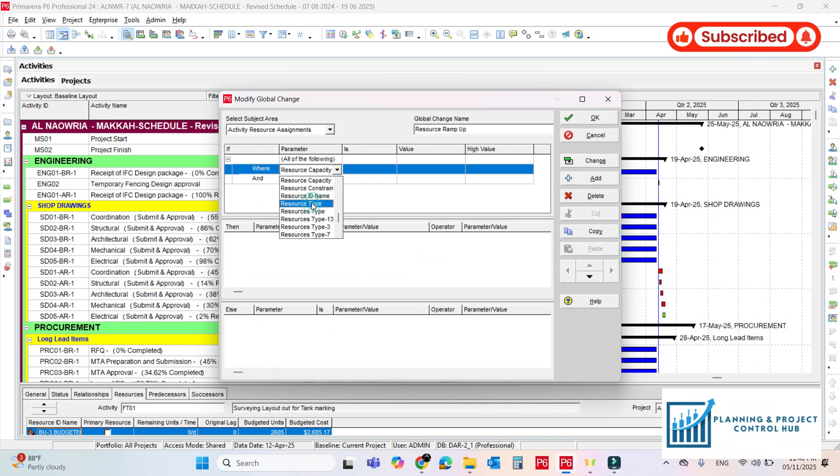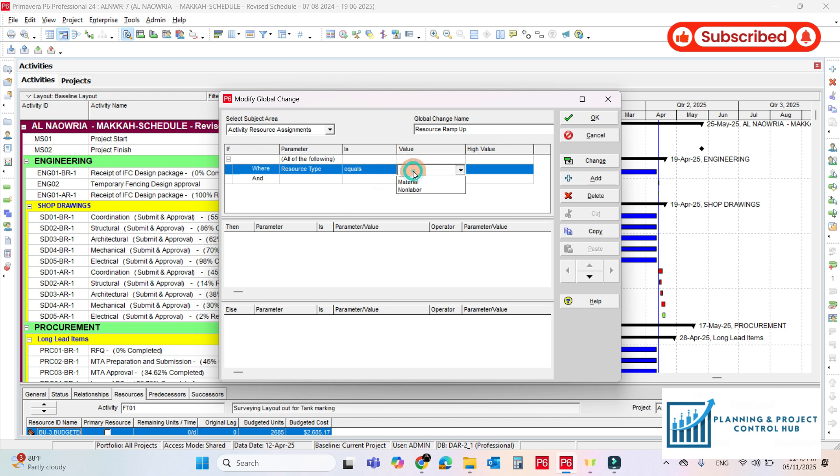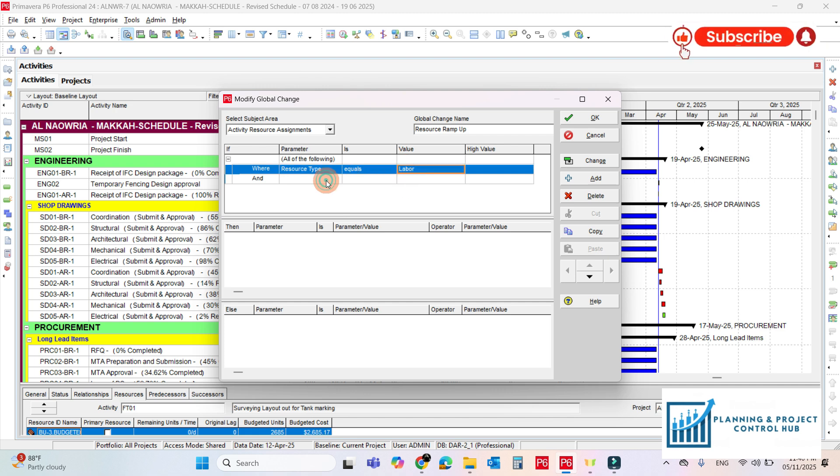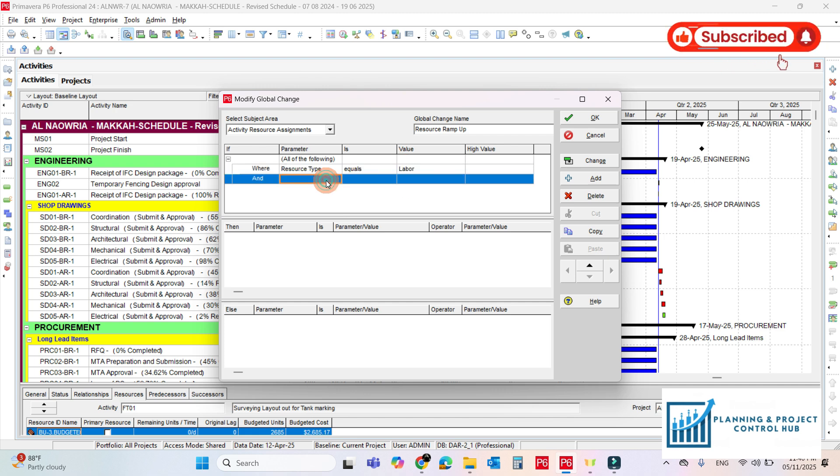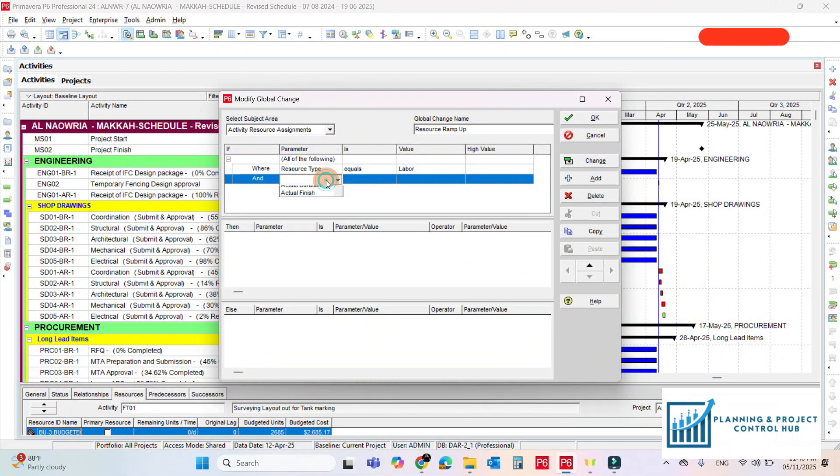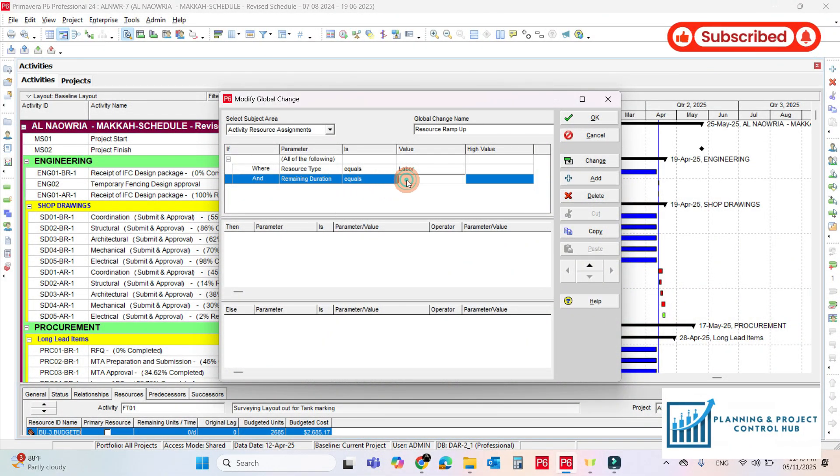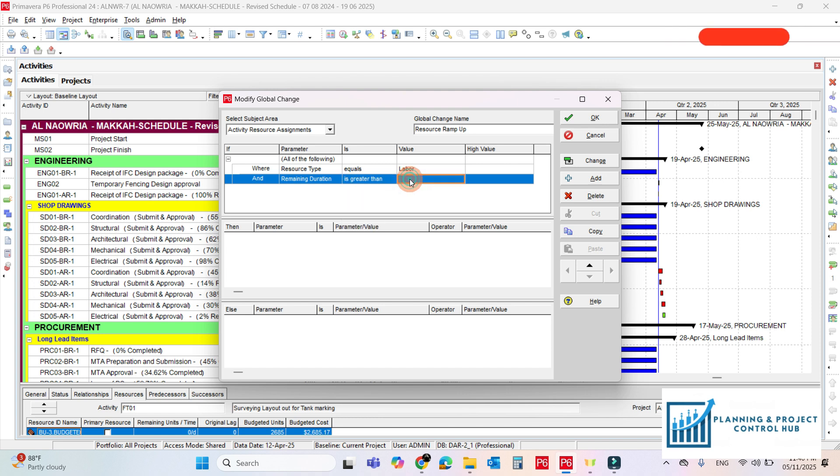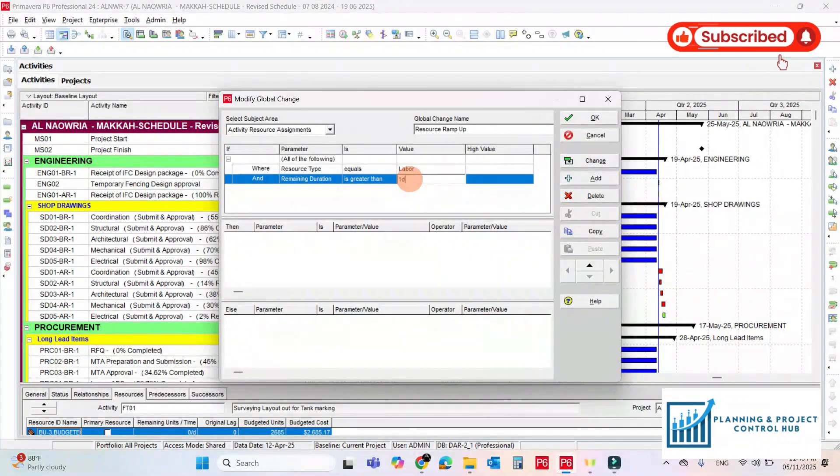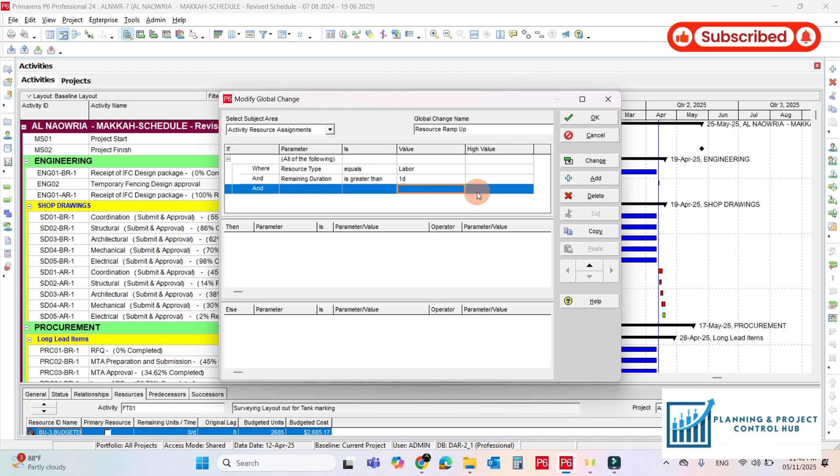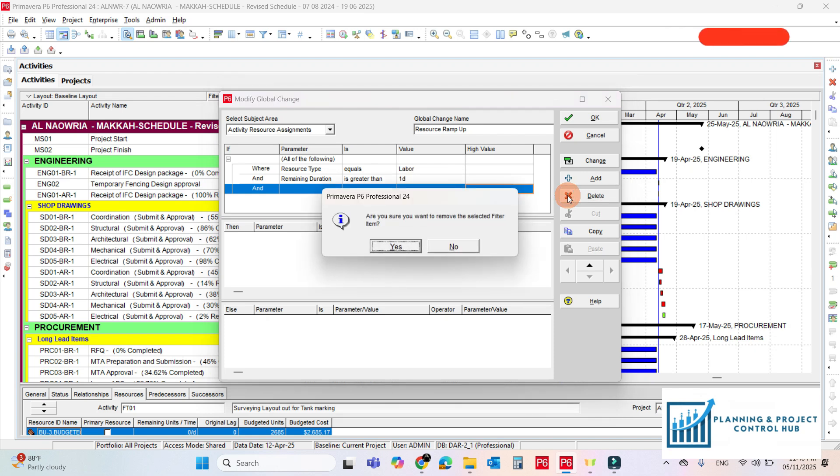The resource type, it should be non-labour. For the not started activities we will use the remaining duration. So remaining duration, it should be more than one day. Remove this one.